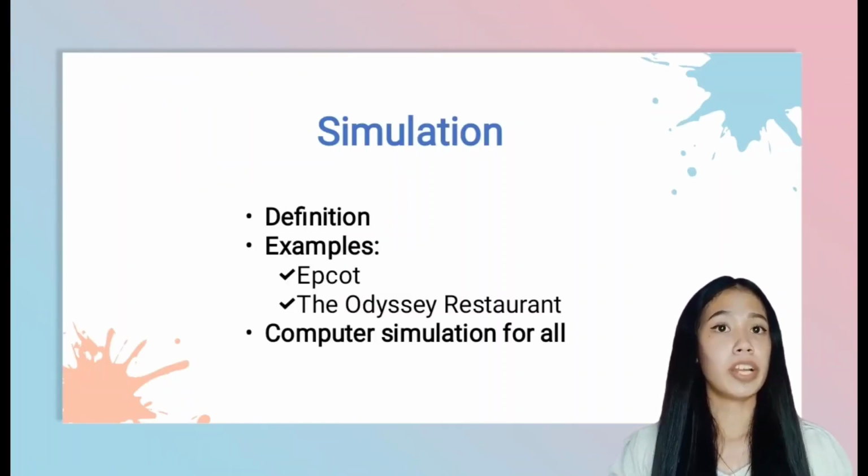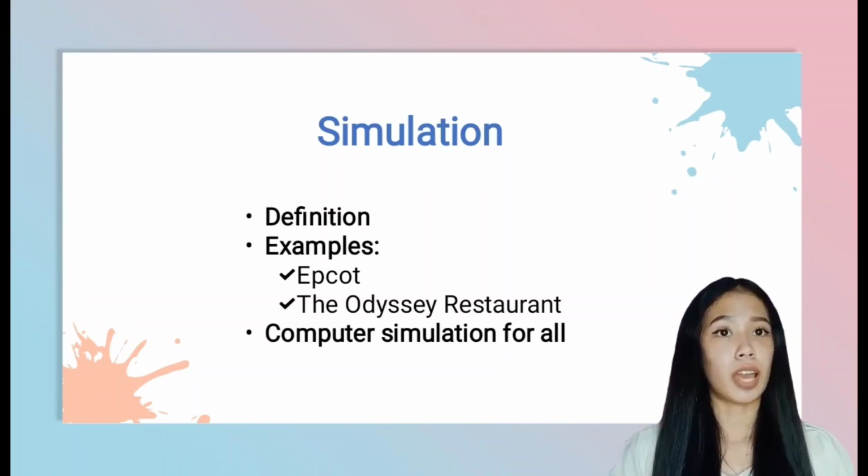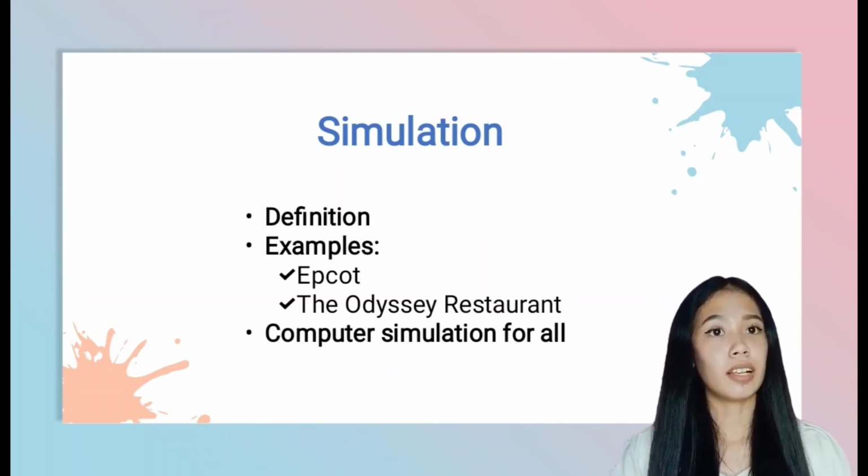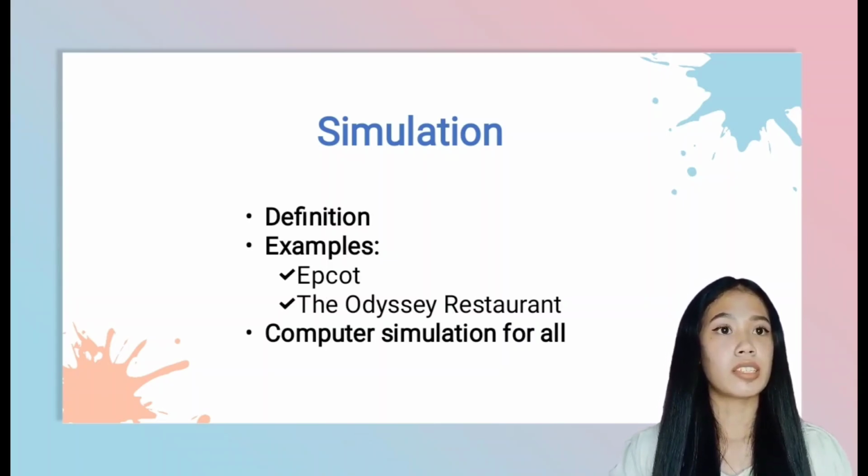In addition, the PERT simulation approach allows management to cope with the uncertainty and stability of time estimates used in the early planning stage of project management. By simulating the PERT network, the PS model reveals the likelihood of shifting critical paths while the project is still in the planning or bidding stage.